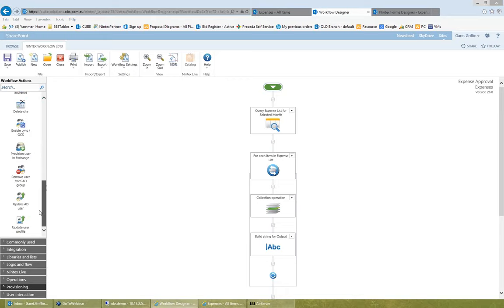Furthermore, there was an additional workflow that ran every morning to gather information from those project sites back up into my daily project status report. So I had stoplight charting in Excel that was being fed by the data in those lower level sites. That's one example of what you can do with the workflow engine. Very, very powerful. So of course we have other SharePoint items.